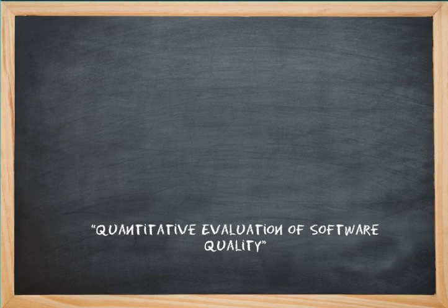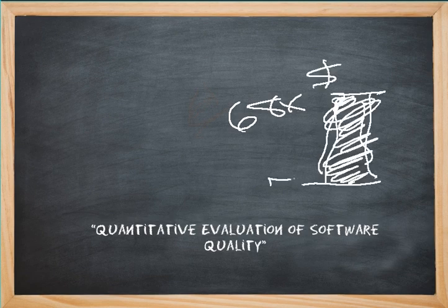Okay, according to Barry Boehm, that's B-O-E-H-M, in his article Quantitative Evaluation of Software Quality some 25 years ago, found that correcting a requirement after a product was put into a user's hands costs as much as up to 68 times the cost. But what the original effort would have been down here. But by the time it gets in the customer's hands and the requirements weren't right, it can cost you.